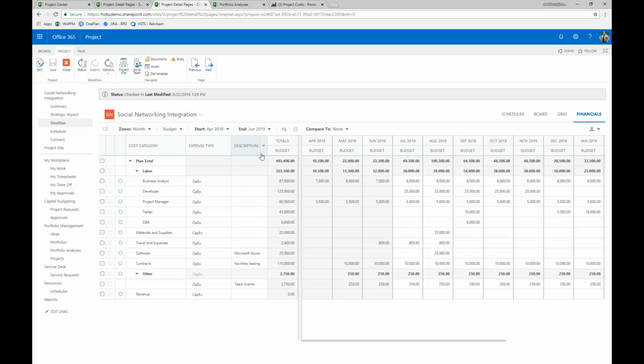So when I was showing you those comparisons earlier, the green, yellow, red indicators and the tolerances for when they change, you can obviously change those heat map tolerances to reflect what that represents to your organization. Maybe a 10% overspend is yellow and a 15% overspend is red, or change the values to match your organizational needs.